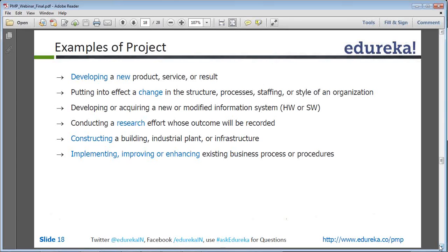Does managing the production support qualify as a project, considering that it is of the nature of an ongoing activity? Managing production support by itself is not a project. Production support itself is an ongoing activity which is operations. However, in support activity also there is one phase which is a project, and that phase is the transition.